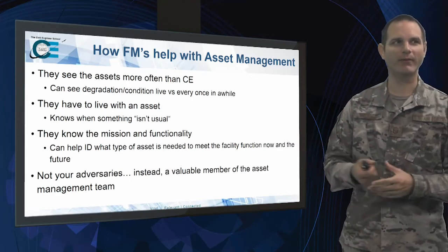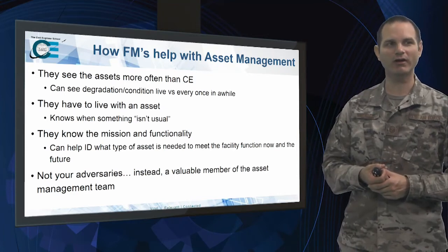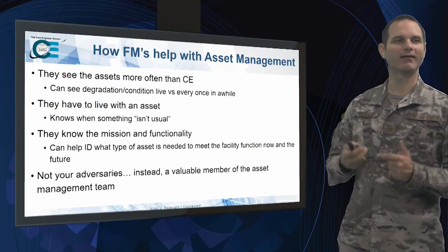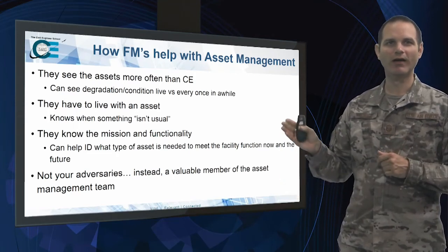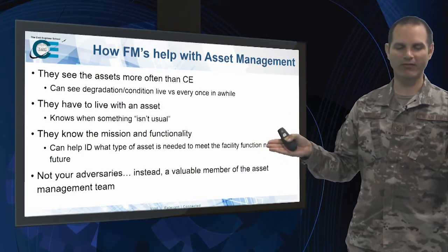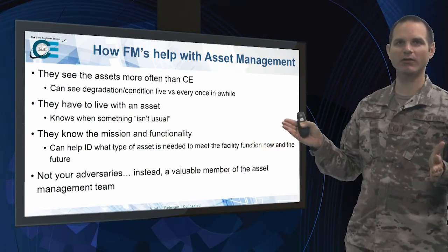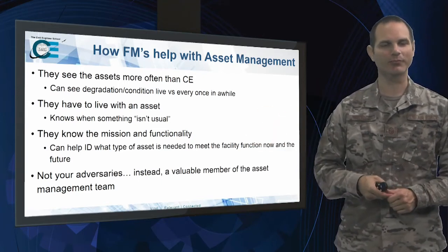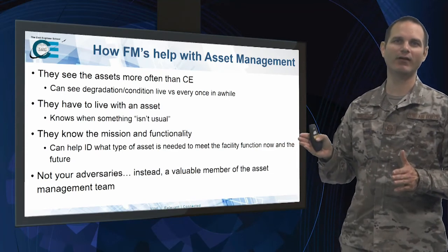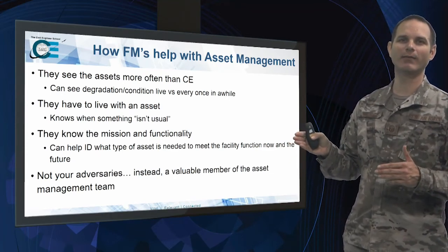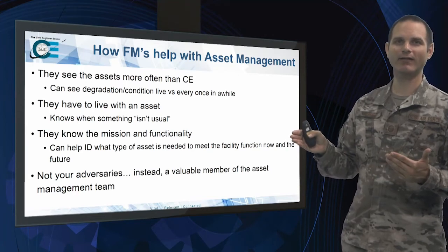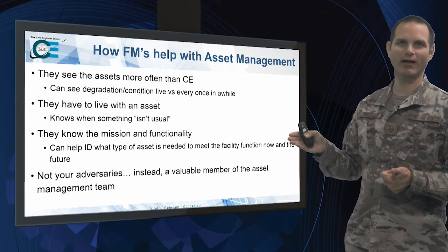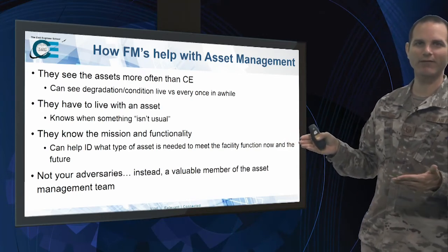So our sub-amps, maybe they're planning on installing a new air conditioner because that air conditioner is reaching the end of its service life. We can't do our sweet spot replacement anymore. So we're planning on replacing that air conditioner with a like unit and being good, right? It's a 20-ton air conditioner, we're going to replace it with another 20-ton air conditioner. If we don't talk with that facility manager, we might not realize that there is a DoD mission coming down the pipeline that's going to be in that facility, maybe 3 years from now, and that's going to increase the BTUs in that facility.